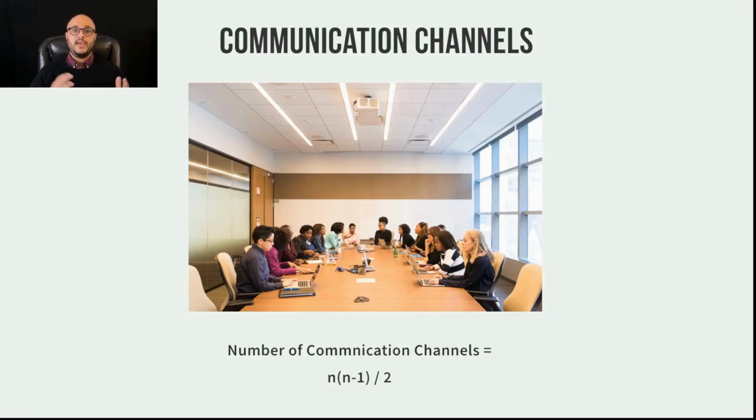Let's assume that we have three people, Mary, John, and Mike. I want you to imagine them standing in a triangle. Mary is able to talk to John, and likewise, John is able to talk to Mary. So that's one communication channel right there. Mary is also able to talk to Mike, and Mike is able to talk to Mary. That's another communication channel. Mike and John are able to talk to each other. That's a third communication channel. So between the three people here, we have three communication channels.